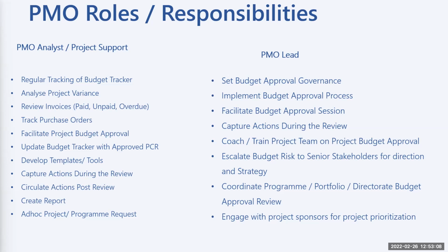The following month, you send an invoice of 2,000 pounds, then your PO value is reducing, right? So your PO value will be around 2,600. And as the months progress, you are tracking that purchase order so that you can highlight to the senior stakeholders,